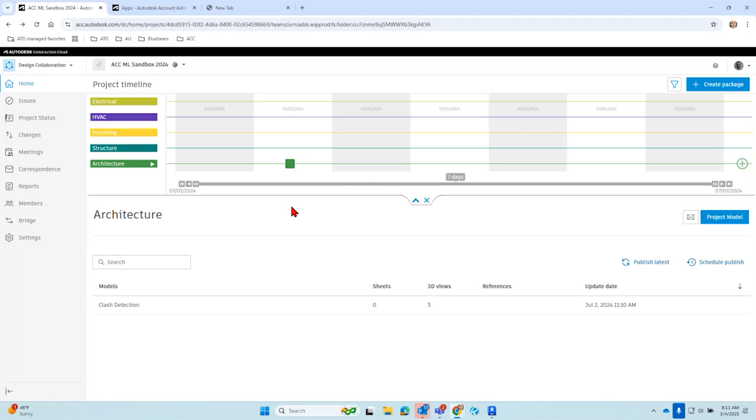So if I'm syncing and working every day within design collaboration using the shared method, you have to actually hit shared to all team members to receive a new file in the shared location. Then there's a consumed file method, and there are some rules behind it too. If you're afraid somebody's going to mess up your whole folder structure, the consumed method is the super secured method because you're only giving people access to their own specific file.